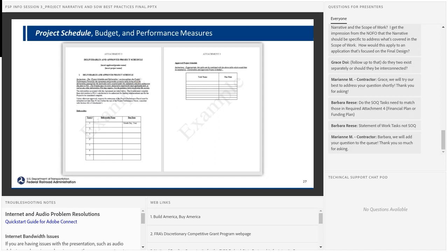The deliverables will also include, if they're included in the project, draft and final NEPA documents, preliminary engineering, final design, and the final performance report. Sometimes our project managers like to see other deliverables included in there, but you will work that out with your project manager once your project is selected as you move to grant obligation. But when you're completing this for the application, the deliverables are generally the paper deliverables. The milestones schedule is the one on the right, task name, including things like initiate construction, end construction, that type of stuff, is more appropriate for this table.